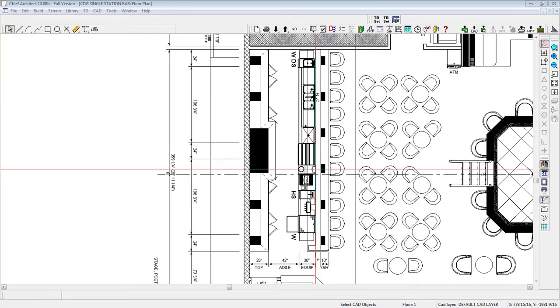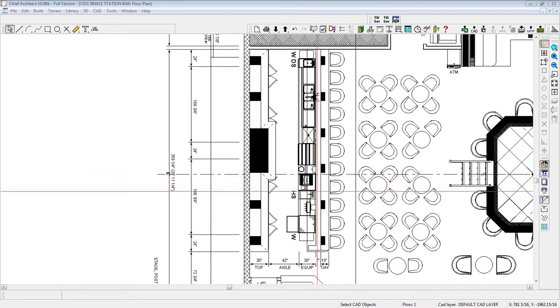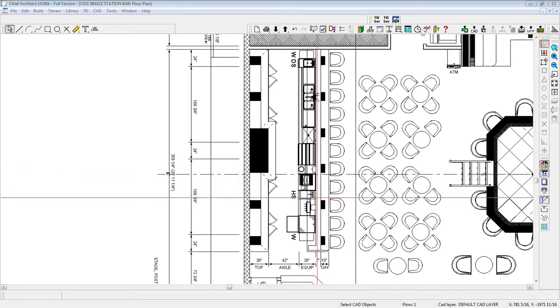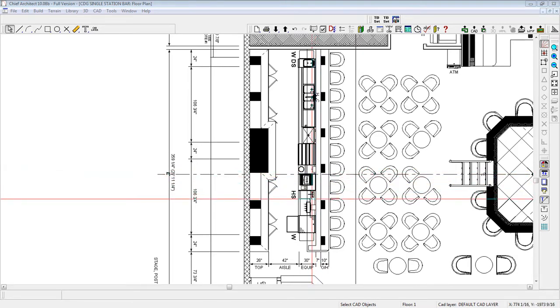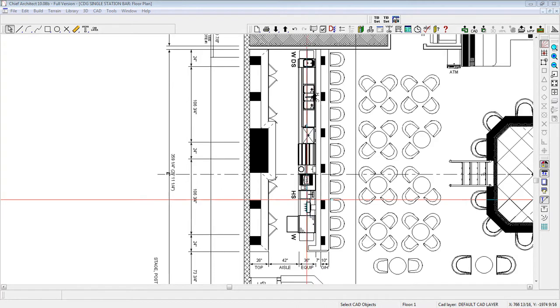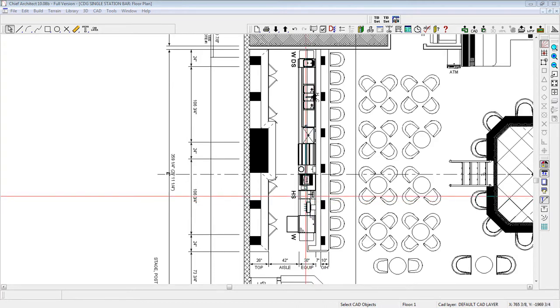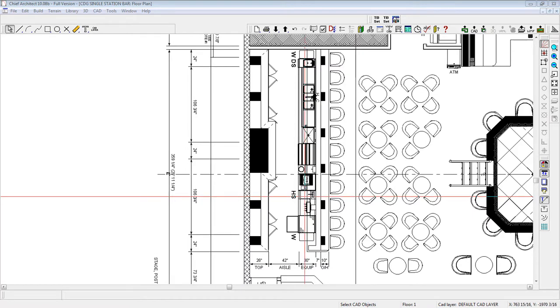First, how much does it cost to build a bar? From our previous post referenced below, we priced a single bartender station about 18'6" of underbar equipment at $6,075. That breaks down to $328 per lineal foot.